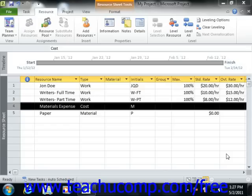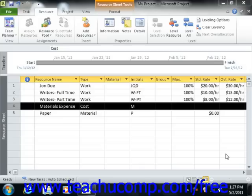The work and material resource types that you have created within the previous lessons can have default costs and pay rates associated with them. This assists you in recording the costs associated with completing your tasks. This information can help you keep your project within its financial constraints and help you improve your future estimates of costs involved with certain tasks.